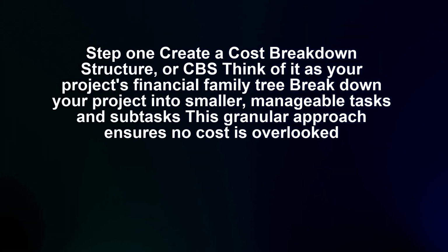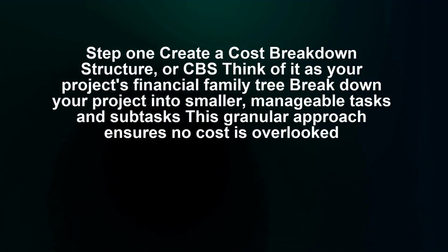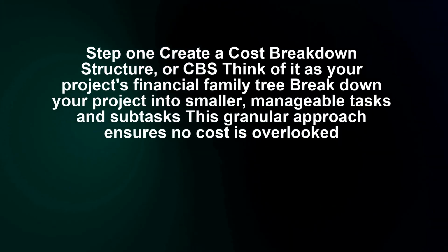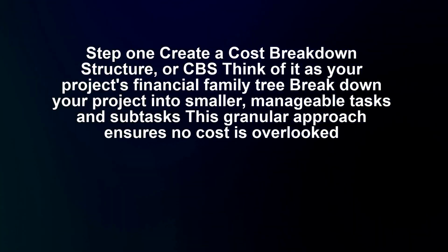Step 1. Create a cost breakdown structure, or CBS. Think of it as your project's financial family tree. Break down your project into smaller, manageable tasks and subtasks. This granular approach ensures no cost is overlooked.